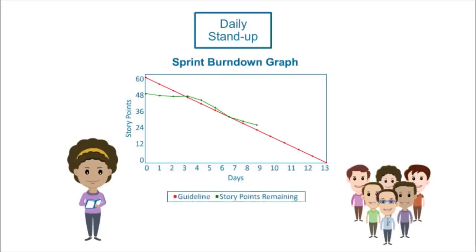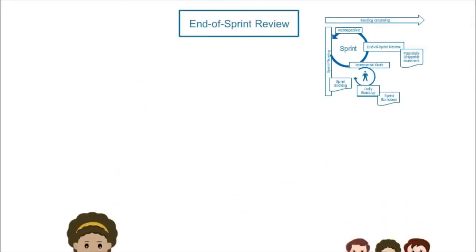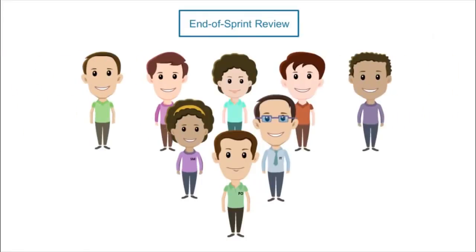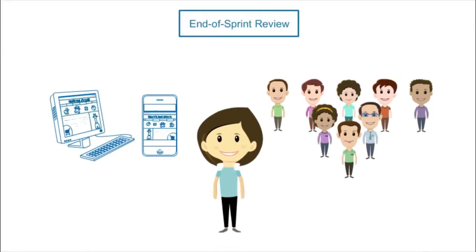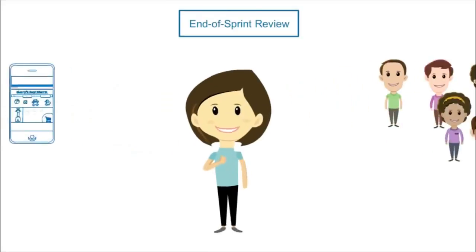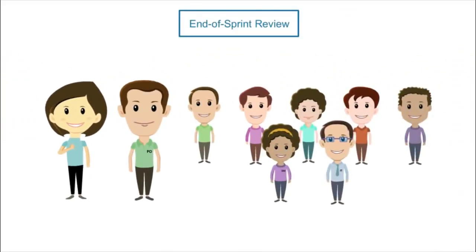Tammy records all progress in the sprint backlog. As the team does their work, she updates and shares the sprint burn-down graph with the team. This graph highlights the progress made in the sprint and how much work is remaining.